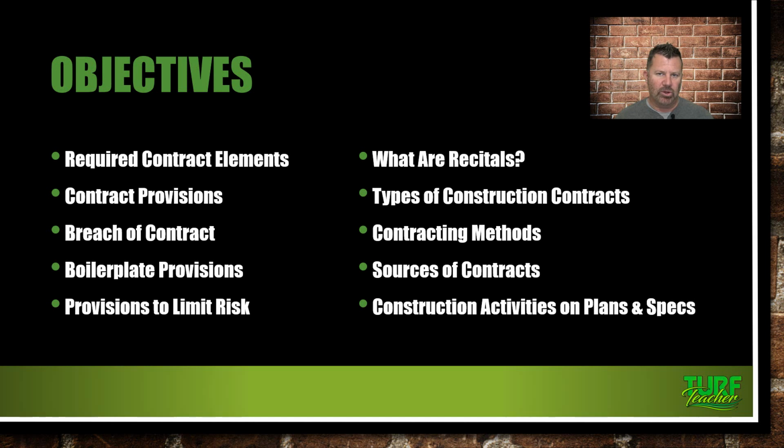What if you're working on a large commercial site, and this could even happen in a residential setting as well. You're bidding on a larger project. So I'm talking $100,000 poolscape for a residential client, or this could be a much larger project on a commercial job site. With this, the landscape architect designs the project, and then they will help the owners submit the plans out for bid. A lot of the landscape architects already have a group of landscape contractors that they're working with. So they've kind of certified them, as you'd like to say. But they help the owners collect the bids and go over them and help them select which contractor is right for that job.